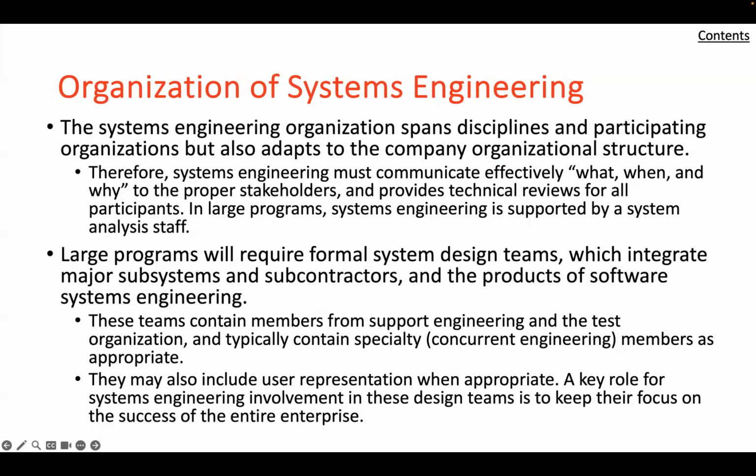The awareness can only be provided by periodic personal communication among the responsible participants and the documentation of any resulting agreement, interface definition, and so on, however small or tentative. System engineering must provide the glue that binds these items of system design through the formation of interface working groups and the development of interface control documents and such less formal communications as may be needed in special cases.